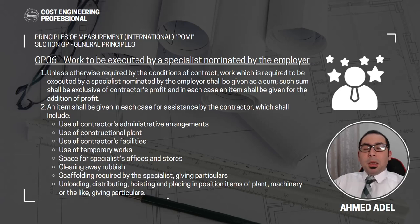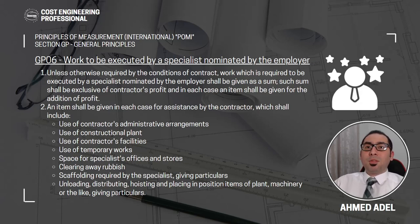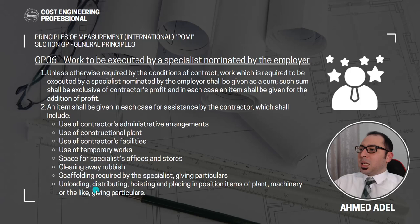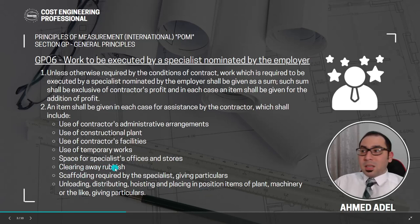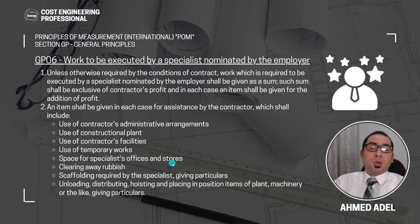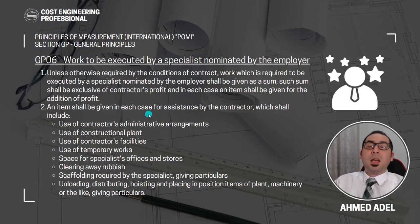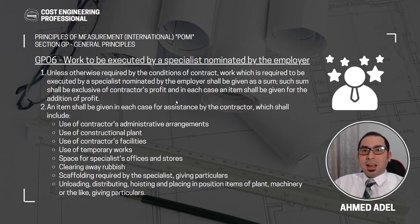For example, if the elevator is a provisional sum item executed by a specialist nominated by the employer, this item will cost say one hundred thousand — that's the money paid to the specialist. But for the specialist to do his work, he needs assistance from the main contractor: scaffolding, unloading, distributing, hoisting, placing materials, clearing away rubbish, and space for his offices and stores, since he is an outsider to the project. That's why we keep this second item.